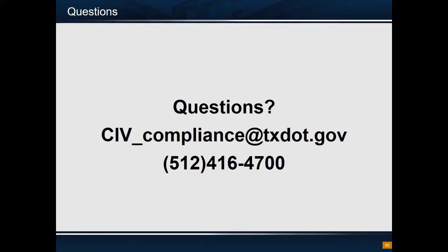May the DBE use a staff leasing company? Yes. If the DBE uses a staff leasing company, then that is their actual crew or labor. The documentation will sometimes reveal itself in a compliance review when looking at payrolls. A DBE can use a staff leasing company as long as it's a legitimate agreement and as long as the DBE actually maintains control of that staff — meaning hiring and firing. The answer is yes.